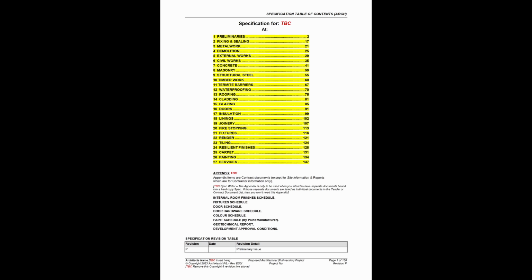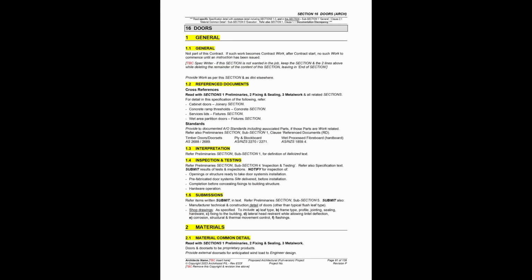Keeping all spec sections has 3 advantages. Firstly, editing is faster. Then, you get familiar with the section numbering. And lastly, the builder knowing at the start what is not in the project avoids full document study to find this out. The first 3 spec sections are common sections, meaning the rest of the spec can't be read without them. Their detail applies to all trades. Having it in one place avoids repetition elsewhere.